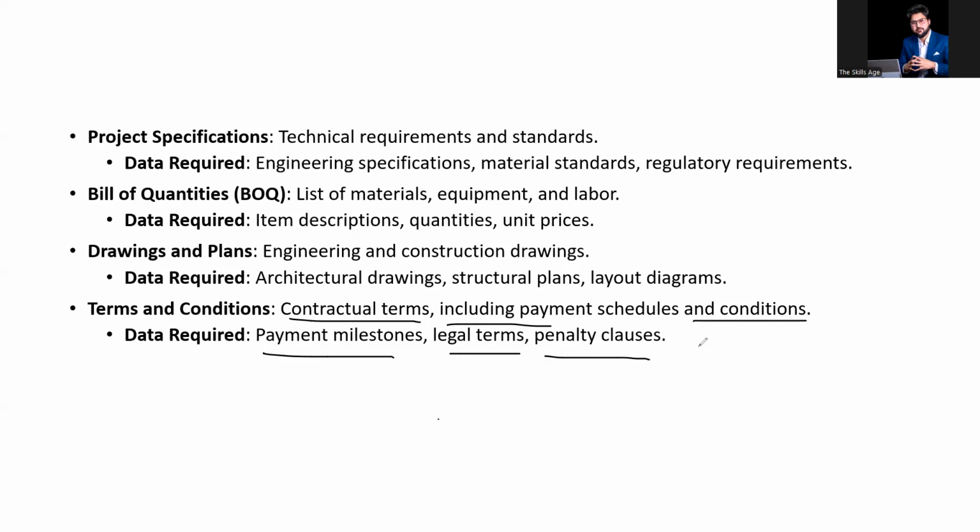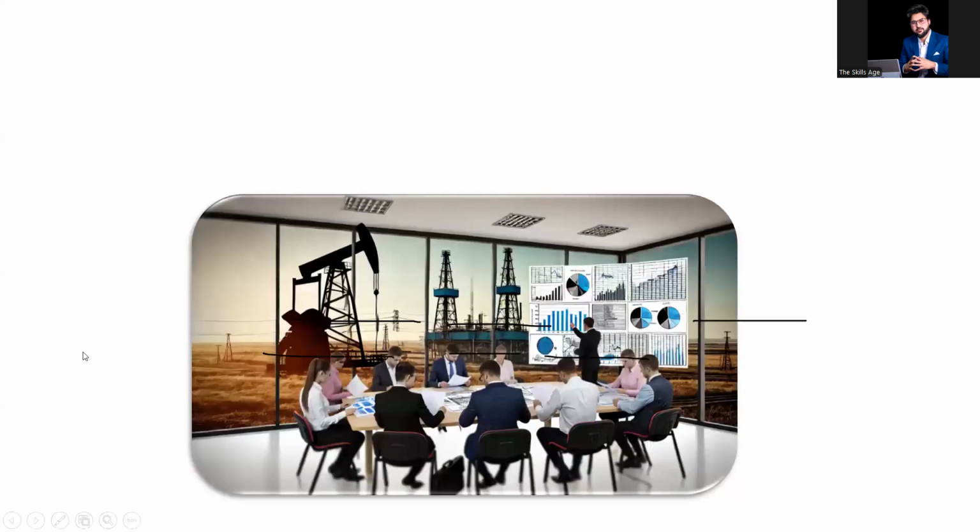Maybe if work is not done as per standard, maybe there are reworking clauses, there are no-payment clauses, there is something like LD, liquidated damages. They are going to cut your money from the final payment and all that. So in the tendering process, you have to understand each and everything to avoid disputes and all that. So that is about it.